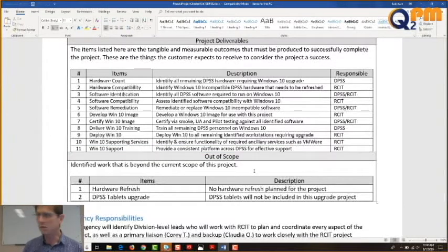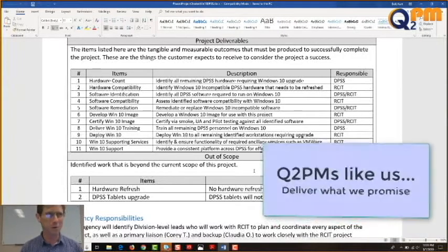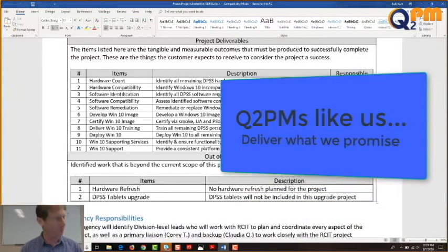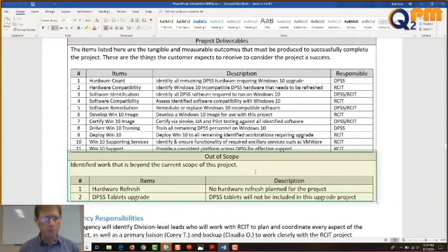At the end of the project, Juan mentioned earlier that there's a part of the project called the closure phase. In the closure phase, I bring this same list up and I say, this is all the stuff we promised you'd get. Did you get all this stuff? And I consider the project can close when the customer says, yep, I got all that stuff. I'm happy.